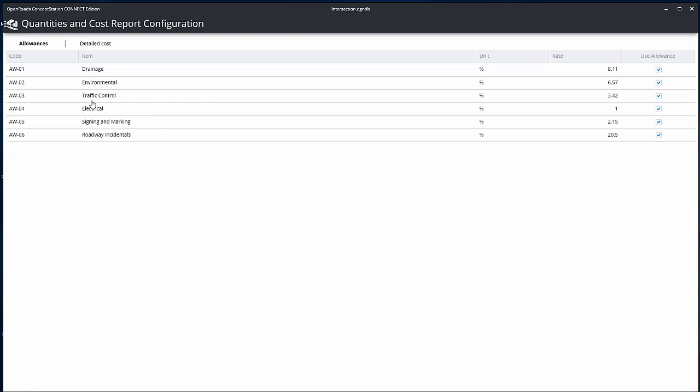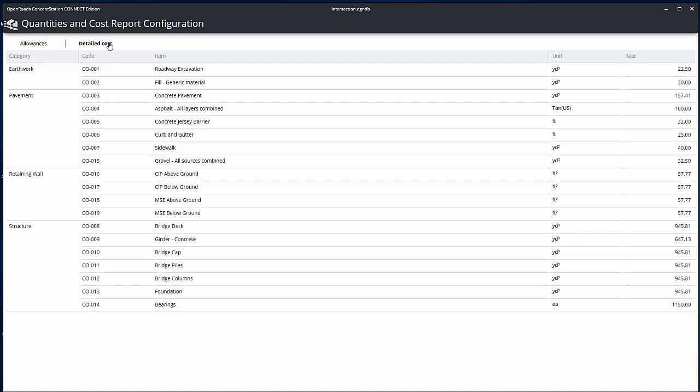In the Detailed Costs tab, you can access the items that are computed from the conceptualized design, including pavement, retaining walls, and so on. The values in the Rate column can be changed to define the value that will be used to compute these costs.